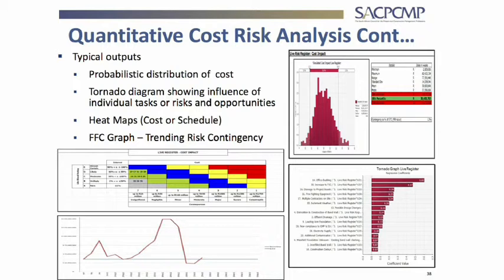Lastly, you have your tornado diagram — the bottom right-hand one. You can rank your risk register to show which risks will have the highest impact on schedule or cost. The tornado diagram shows which risks affect the majority of areas on site — because a risk might affect more than one area. A strike, for example, affects all disciplines simultaneously.